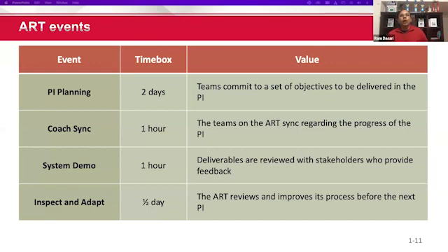All the teams will have additional events or cadences or additional meeting time so that you can cover some of those holistic high-level approaches. For example, the PI planning is where teams meet once in a quarter, once in every 5 iterations, and all the team members meet for a couple of days to identify the objectives so that they know what features they need to work on, what stories they might be working on, and the team will commit to those objectives.